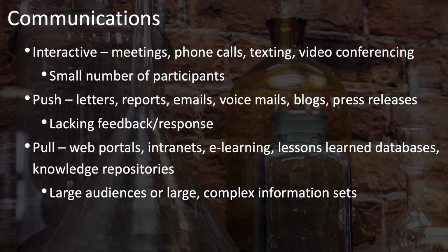Push communications are things that you send out. Things like letters or reports or emails or even voicemails, blog posts, press releases, and other things that you send out to people, but you don't necessarily get any feedback or response. And that's the main disadvantage of push communications. But it has the advantage of being able to send out information to a large number of people so that they're aware.